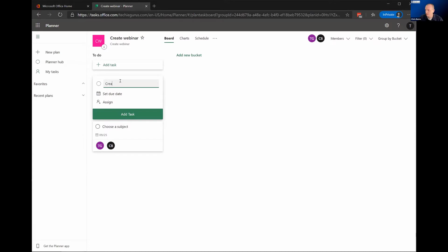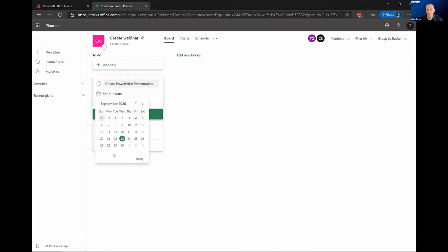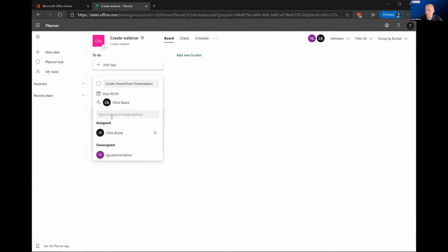So now we want to create a PowerPoint based on the topic that we choose. We could do something like cybersecurity, where we could try and break things down. But again, set a due date. Let's say we want to do this webinar in a couple weeks. So we need to have this PowerPoint done by, let's say, next Wednesday, right? Then again, we're going to assign it to both of us because why not? And once you assign somebody to a plan, they will get an email as well. So just keep that in mind. Don't just start assigning plans out and not realize that you're going to let people know that this is happening. So we want to let them know that you're going to work on this together.